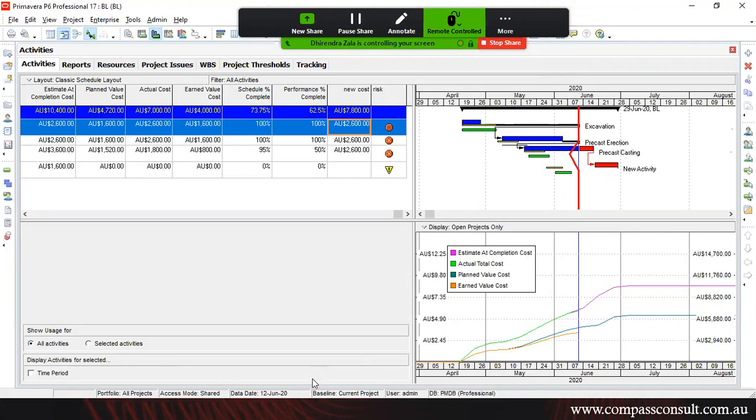I just tried to explain this tool. I didn't take any real example of that. I'm just showing how you can use it, nothing else. You can do a lot of things with that, Arshia. Basically, you can remove constraints from the whole project using Global Change. You can change whatever you want to change globally. You can change the calendar if you want.